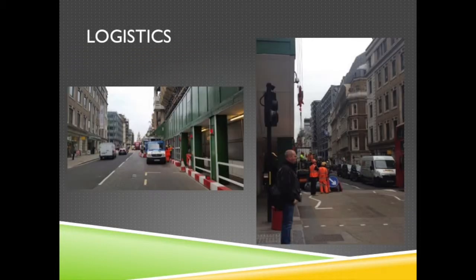Due to the location of the site and the vicinity of offices, construction hours have to be limited by quiet and standard hours. Quiet hours are Monday to Friday from 10 to 12 and from 2 pm to 4 pm. Standard hours are Monday to Friday from 8 to 6 pm and Saturday from 8 to 1 pm. There should be no arrival of lorries outside standard hours, and daytime and nighttime parking are not permitted.